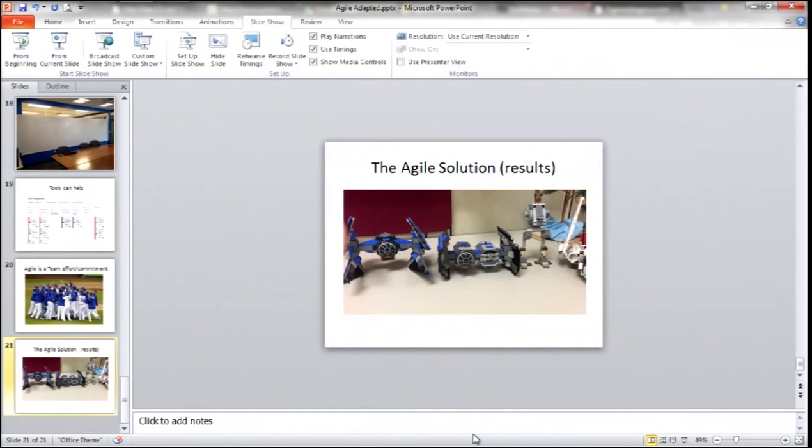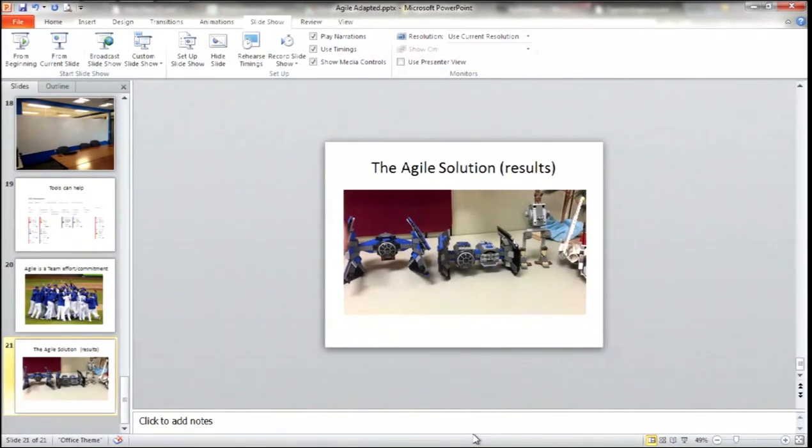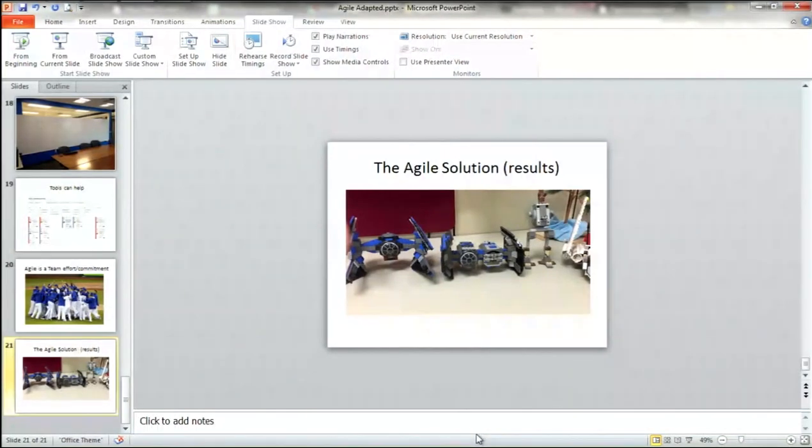And each story can be part of a broader epic, which that epic can span across different projects. So I have one project over here that's security. I have one project that's just reports. I have one project that does warehousing. And I can have an epic that says I need to produce a report about historical something in our data, pensioners in our system.